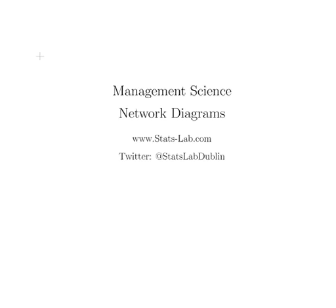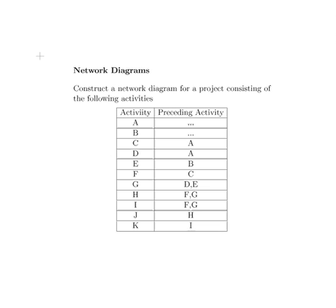In this presentation we are going to look at network diagrams, how to construct a network diagram based on a schedule of activities. Here we have a schedule of activities, and beside those activities we have the activity that must be completed before that activity can start. For example, C can only start as soon as A is finished, and so on.